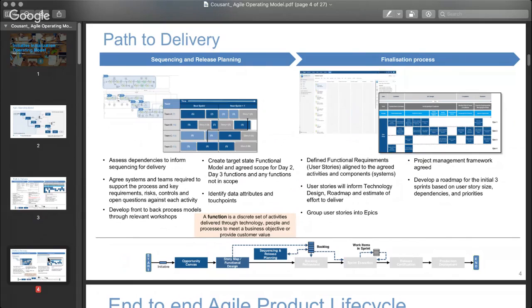Technology will then go through the grooming process. That's just their analysis process, to get it from a systems perspective ready to start executing. So they will group your user stories into deliverables, which they call epics. Epic 1 might be feature, contact information. Epic 2 might be feature, change design, whatever it might be, right? So that's how you're going to end up grouping it. And from there, you can follow your regular life cycle where you've done your QA, you then go into UAT. And then from UAT, you might go into pilot deployment.